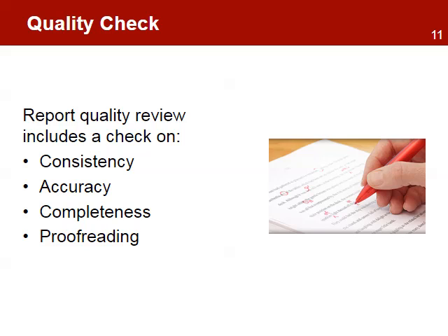This is an important step. It ensures that the reports contain the information requested in the format requested and in the time requested. The quality check should be done by a person that was not directly involved in the development of the report and can use a simple process to check for consistency, completeness, and even proofreading to check for spelling or grammar mistakes.